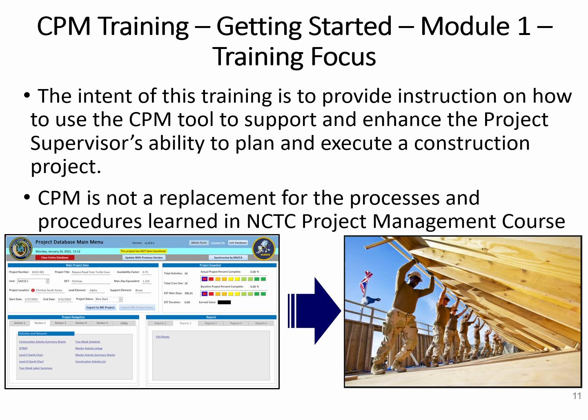It used to be the project management course. There are some differences that you would see in both courses. CPM cannot handle a split activity, which is indirect activities like rain delay or toolkit inventory or any other indirect activities that you would have on your project.